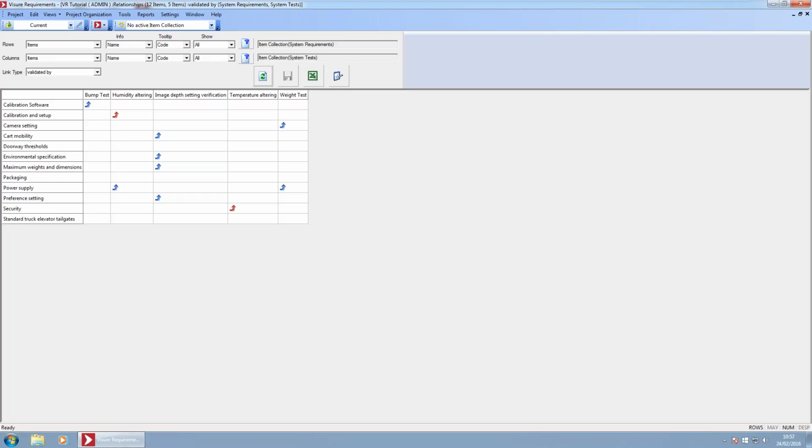Well, basically, once I have established the traceability and I am happy with that, I can activate the suspect traces. And once the suspect traces are active, every time I modify an element, the tool is going to automatically trigger a suspect on the related elements. Basically, the tool is telling me, you have changed a user requirement, but now you have to review that the system requirements related with them are not affected or impacted by the change. So it's basically a mechanism for performing an impact analysis.